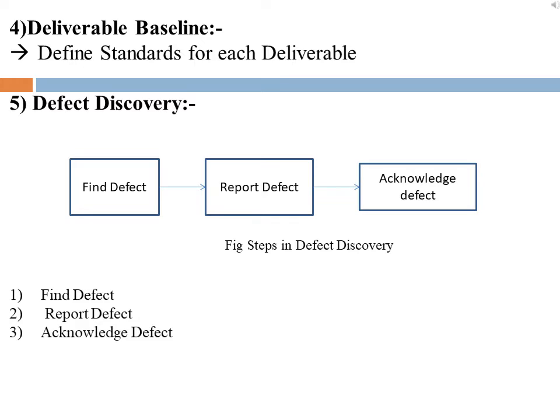To make it easier to recognize defects, organizations should predefine defects by category. Involve knowledgeable, respected individuals from all major areas of the IS organization. The group should be run by a facilitator. The objective is to identify the errors or problems that occur most frequently in the organization and then get agreement that they are in fact defects.